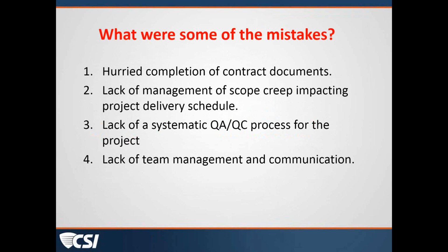And I have seen firms have a QA/QC process that is a documented process. They're able to show that they took their project through that process within their firm, and it changed the mindset of the other side of the party, that, well, we're going to have to spend too much time proving that they didn't do all that, and they've got this process documented, and they show us the documents that they took the project through it. Okay, they missed something. They're not expected to be perfect, and maybe we need to move on to another item. So I do know that it can be a defensive help if you get into that kind of scenario.